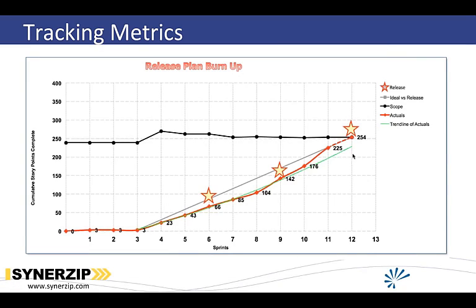And then even things like this. This is a release plan burn up that's showing velocity going up and up and up. The first few sprints were pretty horrible, like in a lot of ones. You've got scope at the very top, and then we've also outlined some releases that we've made in this product along the way. So this was probably for the year 2013, what we were trying to achieve, how much work we wanted to do, how many releases we were going to do.